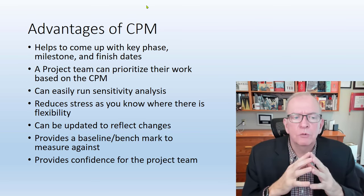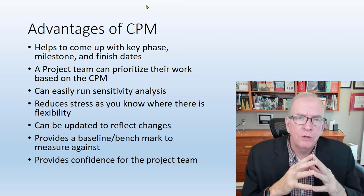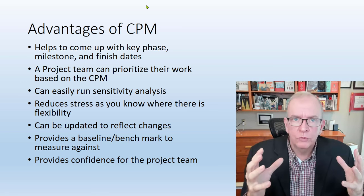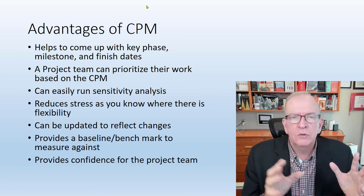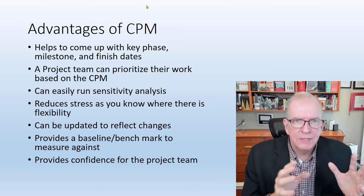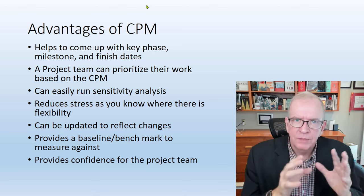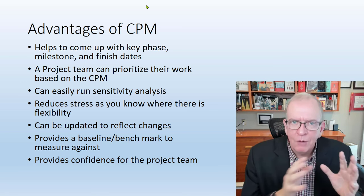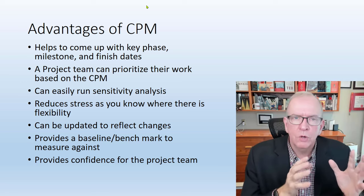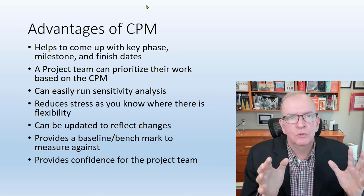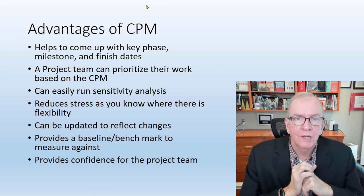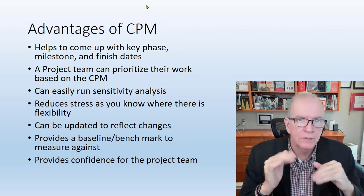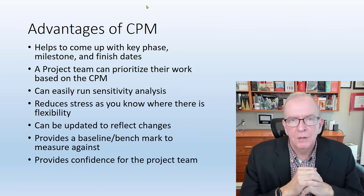A project team can prioritize their work based on the CPM. That simply means if you know which activities are critical and which are not, and you've got limited time — if something is going a little out of whack on a non-critical activity, you're not going to pay as much attention to that as if something on the critical path is going out of whack. Because that one is certainly going to delay your project, whereas the other won't delay your project until it becomes critical. That also helps to reduce your stress level, because not everything is critical on your project.